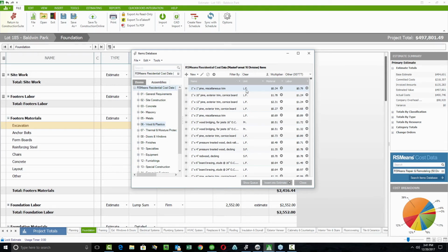Of course, this is how RS Means provides these prices. You may use something different, but I find this beneficial because it's calculated as an average labor cost based on your region. It looks like we might actually be working out of Puerto Rico right now, but it's based on your region, coming up with the pricing and information available for an average cost.